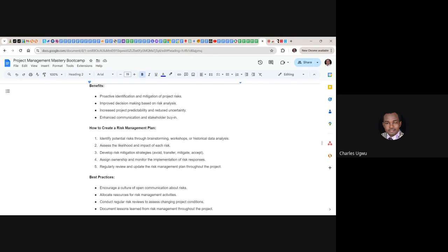If the risk happens, you must have a situation such as contingency plans. If you are starting a project and you have 10,000 pounds, instead of using the 10,000 pounds as initial startup fund, you can start with £7,000. You can even start with £5,000. Meaning that you've kept £5,000 or £3,000 as a contingency plan. That is a mitigation. That is a plan on how to handle this risk.